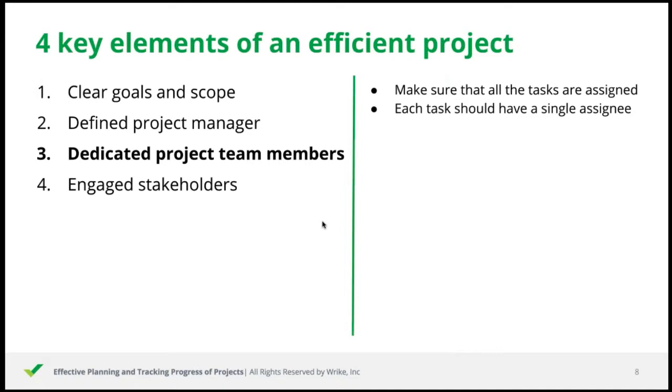With multiple assignees, it is sometimes hard to understand whom to hold accountable for a particular actionable step. If a task indeed involves multiple people responsible for it, it would be a good idea to break it into several subtasks. A good thing about subtasks in Wrike is that each of them behaves just like any regular task, and you're able to assign and schedule subtasks independently from the parent one.